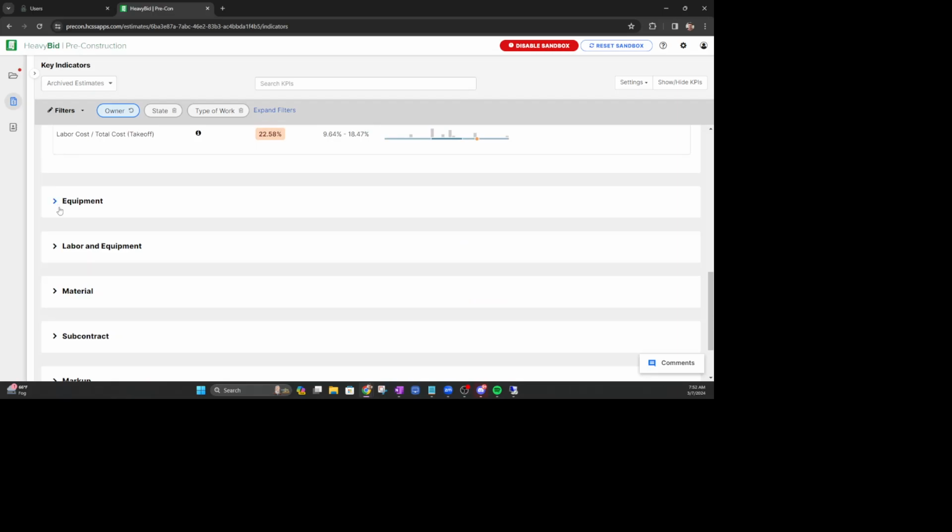The only other thing I will mention, if you want to maximize the use out of Estimate Insights, is to filter and tag your estimates so that you're looking at the right subset of work to compare this against. It might not be relevant to compare this to every estimate you've ever done. You might want to filter down by a specific owner that you've bid for, or a specific state that you've bid in, or a specific type of work that you do. You might not want to compare your highway transportation DOT estimates to some private site utility work that you're doing, because those are different scopes, different margins, different KPIs that you expect to see.